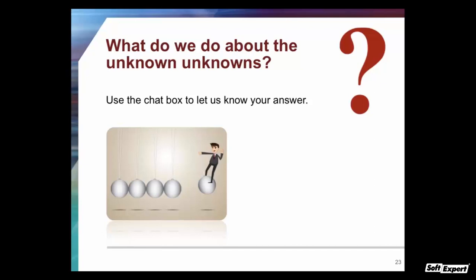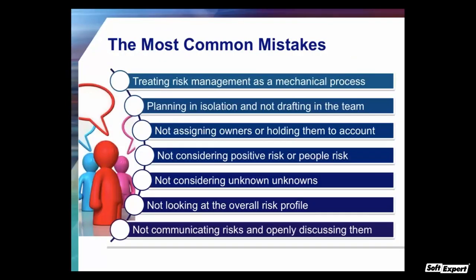What are the most common mistakes in risk management? Mistake number one: treating risk management as a mechanical process where you just fill in a risk register and think you've done it well. That is so far from the truth — there is much more thought needed. Mistake number two: planning in isolation and not drafting in the team. Risk management is a collaborative effort. You want to create a risk culture in your organization where everybody is thinking about risks, owning risks, and naturally mitigating them — not just the project manager.